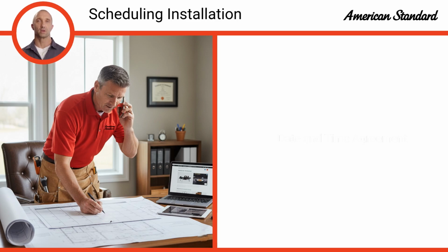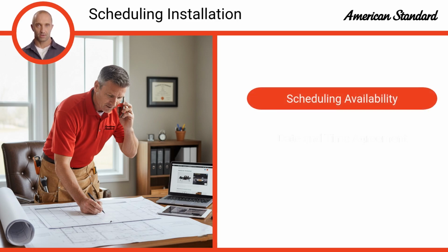Once the products are either en route or delivered, the general contractor can start contacting the consumer to schedule the date and time to begin the installation. The general contractor must contact the consumer using the contact options provided in the work order. It is recommended that the general contractor provides more than one installation appointment to the consumer.